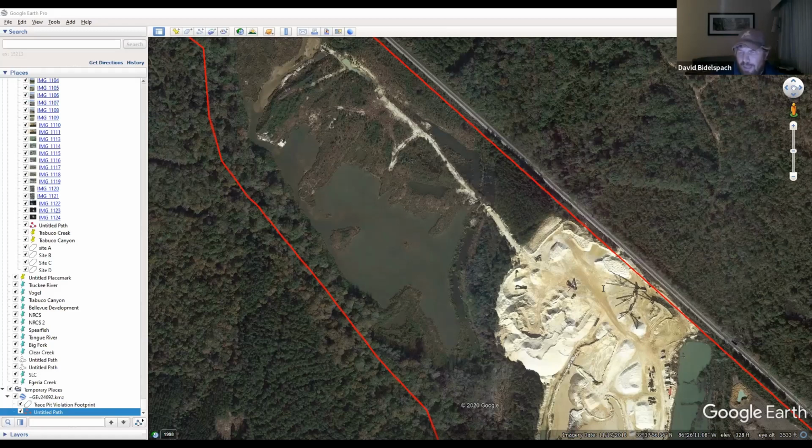Then you basically charge for the hours and do a markup. But how we've been billing him to date, we've been billing him more like an employee. So we have a bigger markup on him, but then we just don't bill him for a lot of his hours because there's things that are not really worthwhile. It seems to work better to bill the client at $75 an hour for less hours when he's not being efficient than $22 an hour for all the hours, because then they're like, well, why do you spend so many hours on it? Like, well, it's only $22 an hour. Yeah, it doesn't matter.